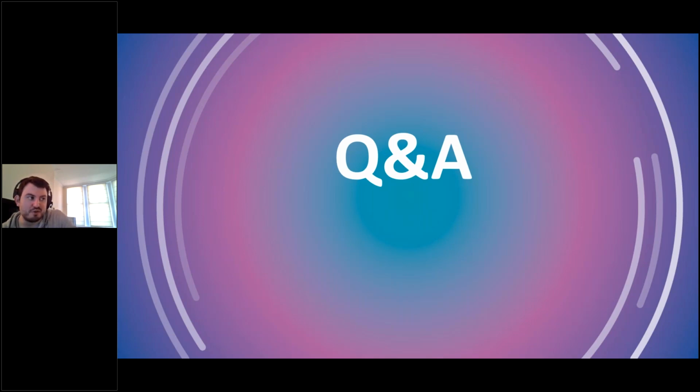So stay floating while I think I answer, and then just come back to confirm if I've captured it or not. So I think I mentioned it earlier, but I might not have been super clear, that there is this standard, which is the technical specification, PD ISO TS 12911, which is currently being revised. Now, the intent of that document itself was to be the set of requirements and recommendations for a business to develop effectively their own SMPs, standard methods and procedures, in-house as to how they would work as their own organization. So, for example, if a business wanted to set out file naming conventions, their own standard codes, and other bits and pieces, the intent was that that standard specifies how you might structure what many people would call the CAD manual or the in-house BIM SMPs or similar.